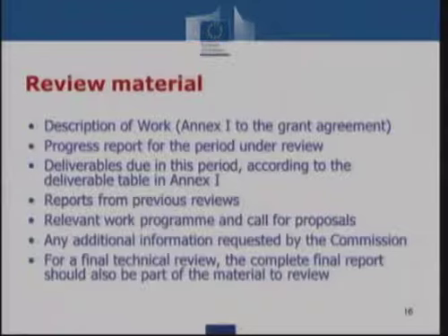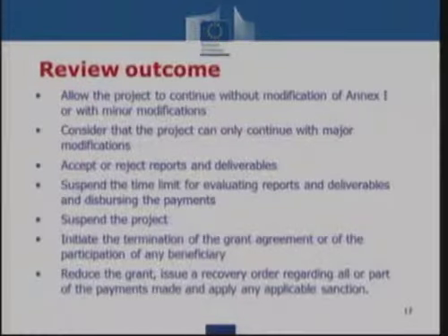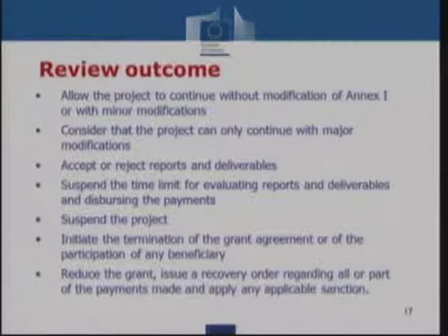Also, as I said, in the review meeting, the deliverables and the reports will be assessed in order to accept or reject them, and that has an impact on your payment. It may be that we suspend the time limit for evaluating reports and deliverables and disbursing the payments. It could be that a project is suspended. It means that there are real issues with the project, which maybe you have highlighted yourself in the review meeting, or which the experts came across during the review process.